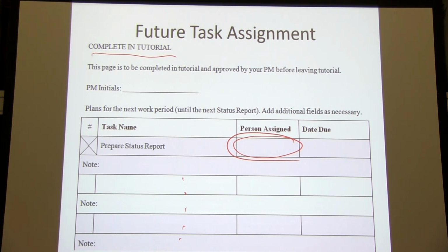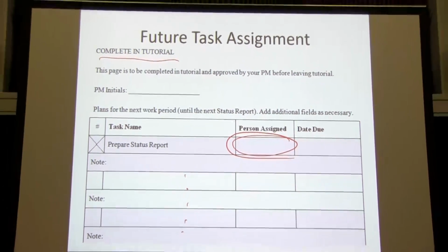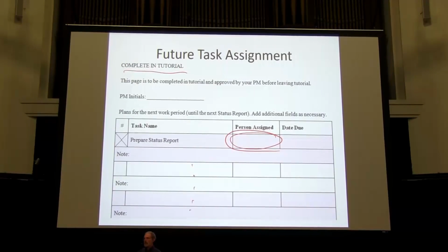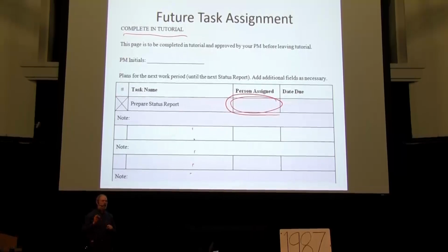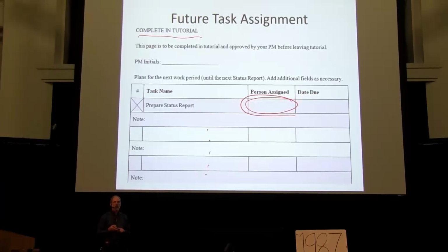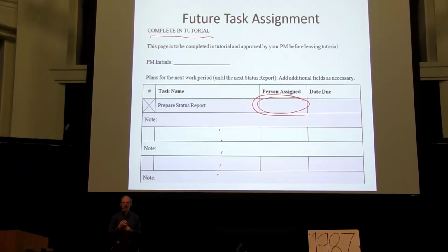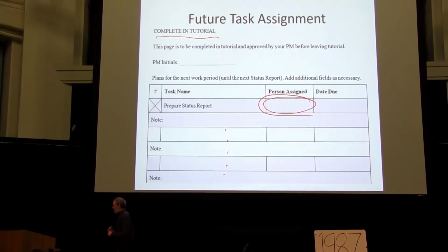You want to make sure that everybody reads this, so I personally follow the following formula. I say the status report, except for that last page, has to be emailed to me 24 hours before and copied to everybody so that everybody else also sees that status report so they know what they are going to be held responsible for.